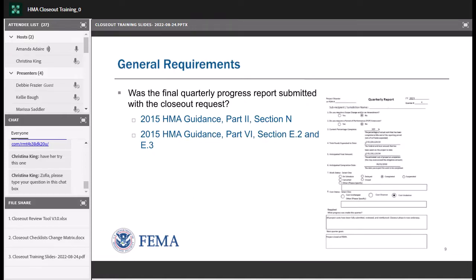We're looking for the final quarterly progress report to be submitted with the closeout request. We check that if it isn't marked final, it shows the work is 100% complete and that the final amounts match what's reported in the rest of the closeout package in the final budget — nothing that would suggest the project isn't done yet.